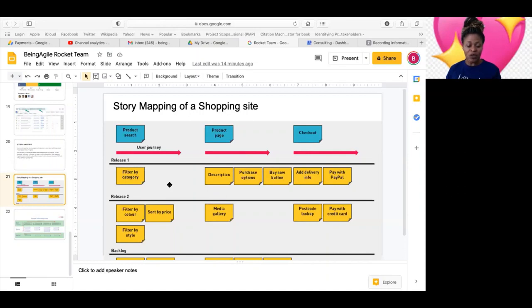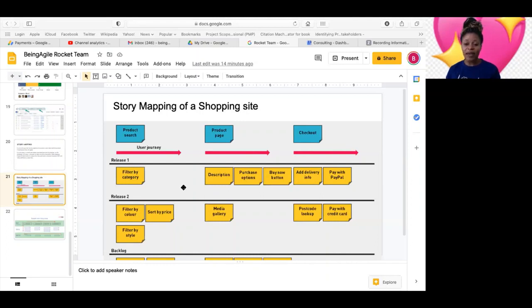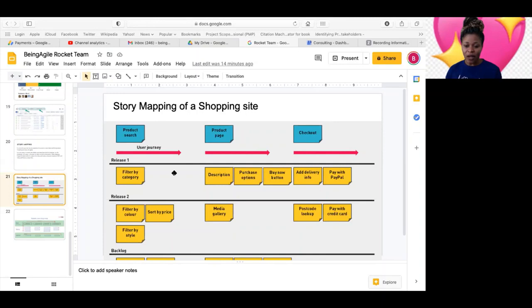And as you identify dependencies, it helps you also identify some kind of impediments that you may not have been able to identify just by thinking that you know this thing in your head and not visually represented.